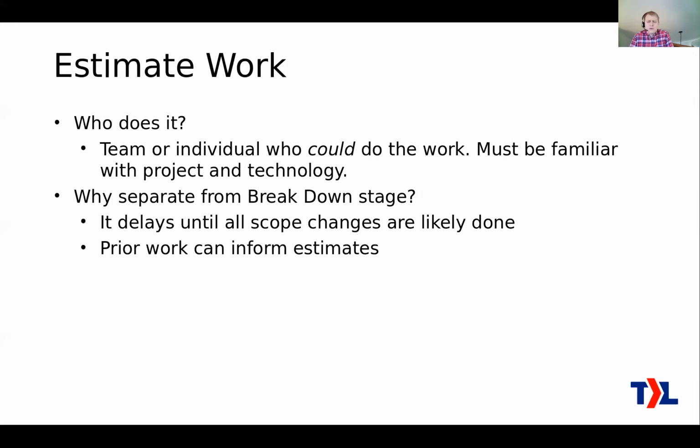Now, you may be asking, why would we separate this from the breakdown stage? Doesn't this seem pretty similar? Well, it kind of is, but there are two benefits of waiting a little bit on this. It delays the estimation until the scope changes are likely done, meaning your engineers are working on other parts of the project, and some of the work they are doing can inform your estimates. Because they might find, we did this work and it was twice as much as we thought.